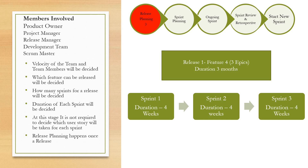The next stage is release planning. Members involved are the product owner, the project manager, the release manager, the development team, and the scrum master. The main objectives of release planning are: the velocity or capacity of the team and team members will be decided; which features can be released will be decided; how many sprints per release will be decided; and the duration of each sprint will also be decided.